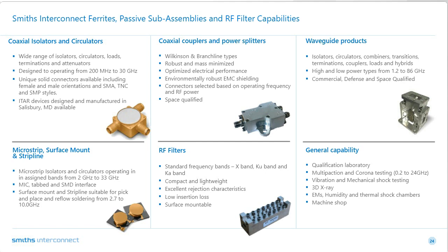So from initial concept and discussion to first prototypes, cutting metal and delivering, I'd say it's somewhere between 5 and 6 months. You may be able to compress it down to 4 to 5, but that's an aggressive schedule.